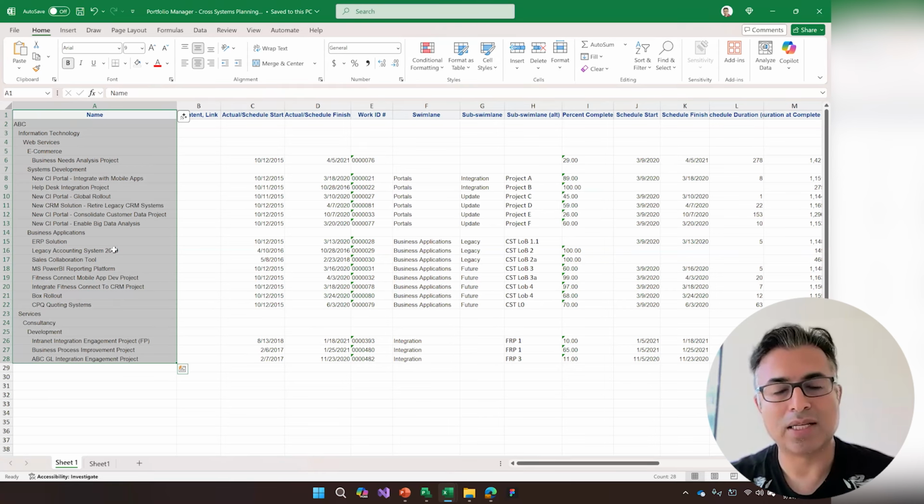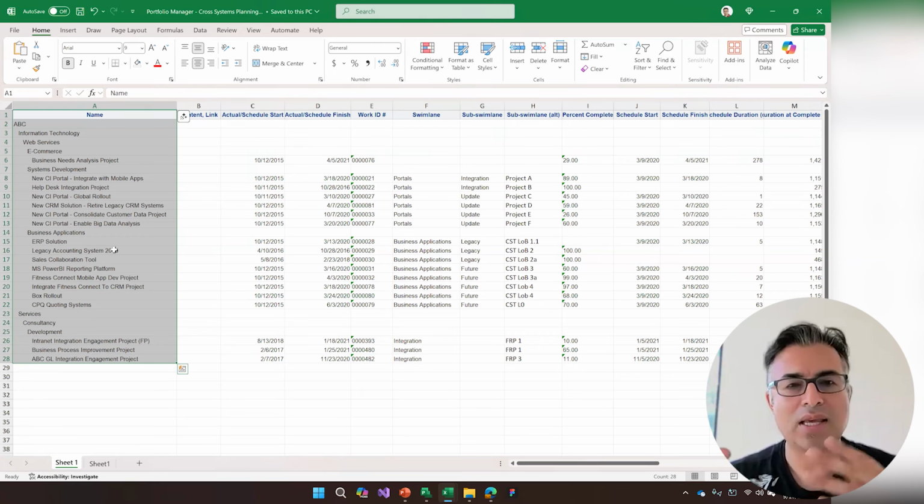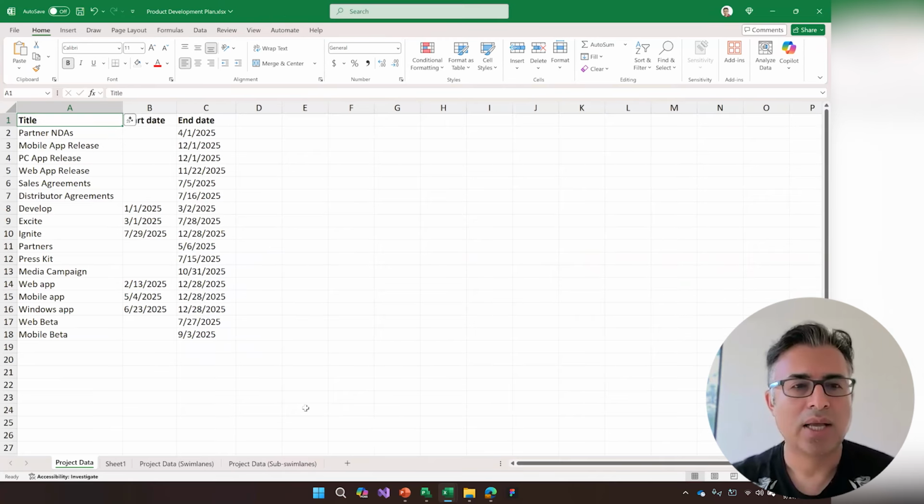Smartsheet has the ability to do that as well. It's absolutely brilliant. You can take 50 projects and create one dashboard report and roll up the items that you want, and you can have a one-page overview, even though you may have 10 different project managers managing 20 or 30 different projects, and then everything gets rolled up into one dashboard report that can be imported as a timeline into Office Timeline. There's an article on how to do that.